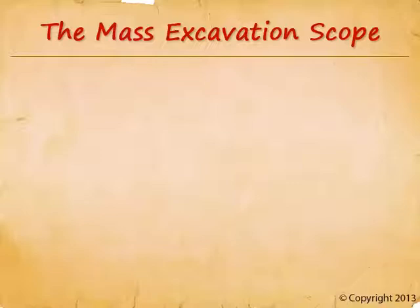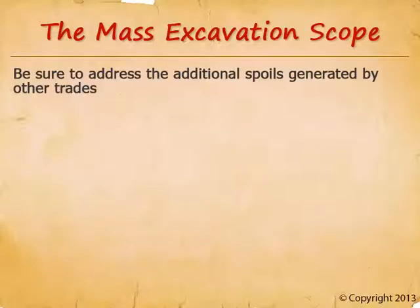Now we'll move into a discussion on the mass excavation trade. With mass excavation, there are comparatively fewer change order requests, but these are regularly very expensive. The most common and most preventable change order issues with regard to this trade involve additional spoils. The following examples are also commonly missed in the bid instructions, and when they are, the off-haul is paid for from the general contractor's contingency. Tapping into contingency is always a painful experience, especially for issues like these that are highly preventable.